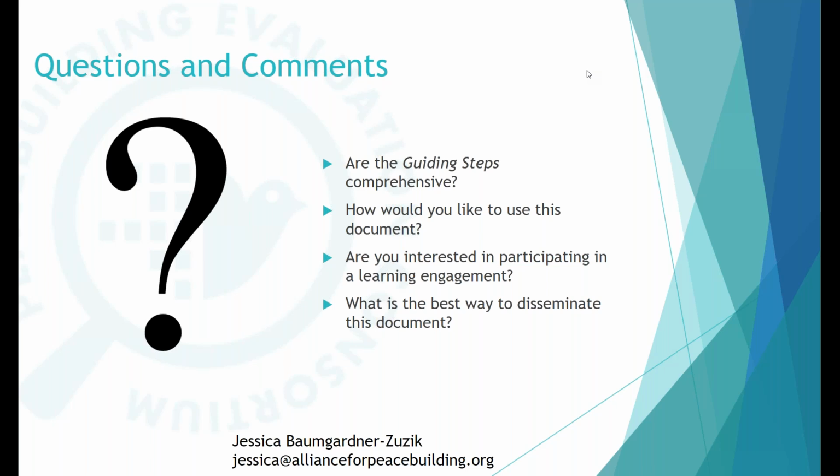I think your question is really interesting. Could we combine a conflict analysis process with our baseline? And arguably, I would say yes. The steps are not meant to be a chronological approach exclusively. Normally, a conflict analysis will be conducted prior to a baseline, but they definitely could be integrated if you've taken into account already what those key goals and outcomes that you're looking to achieve in the program are, and you incorporate those within your conflict analysis.